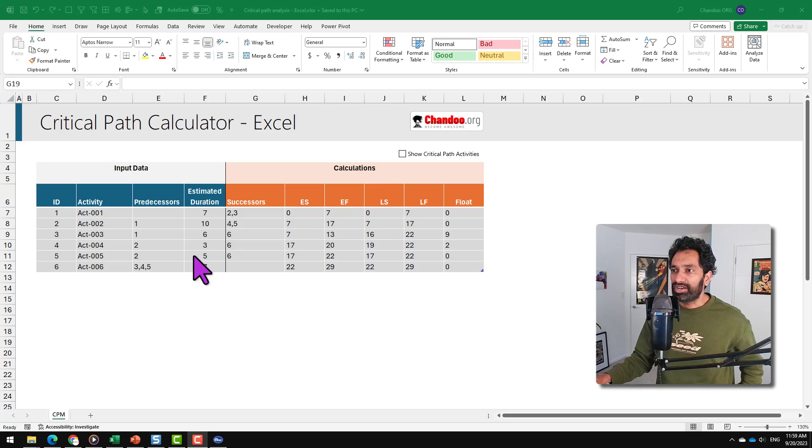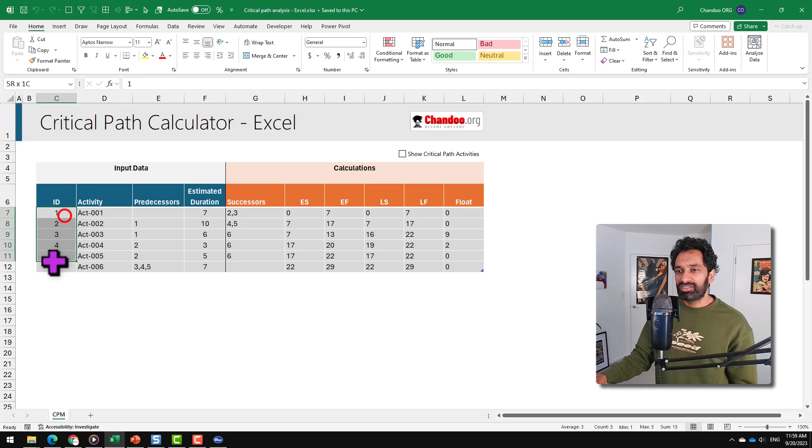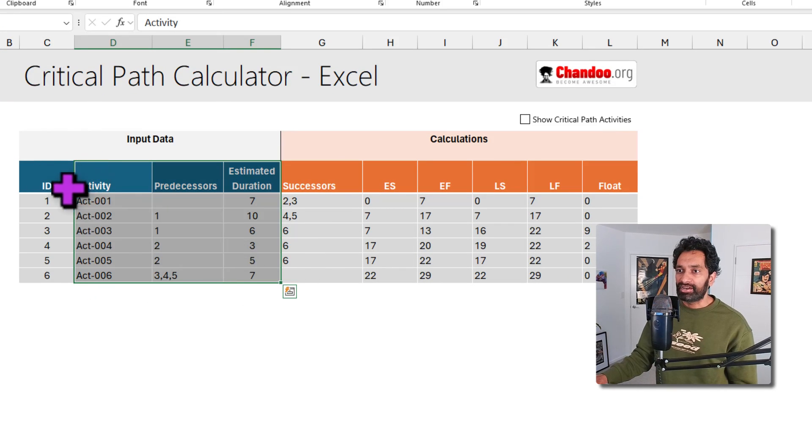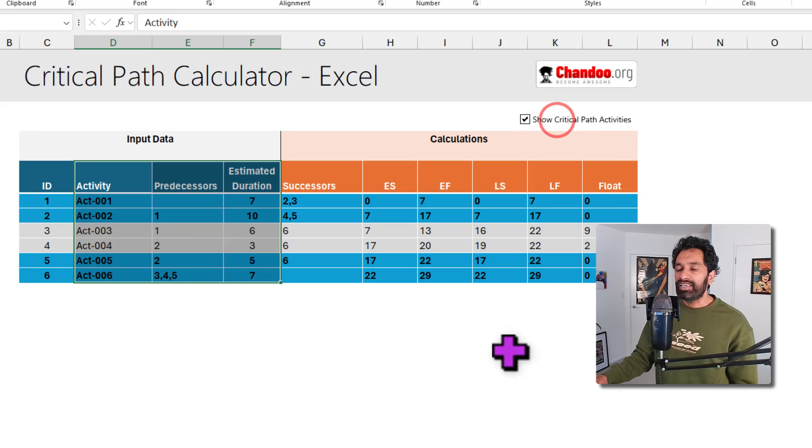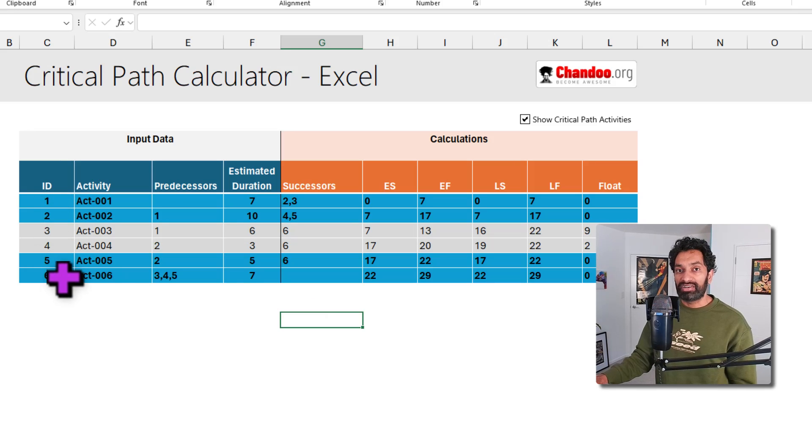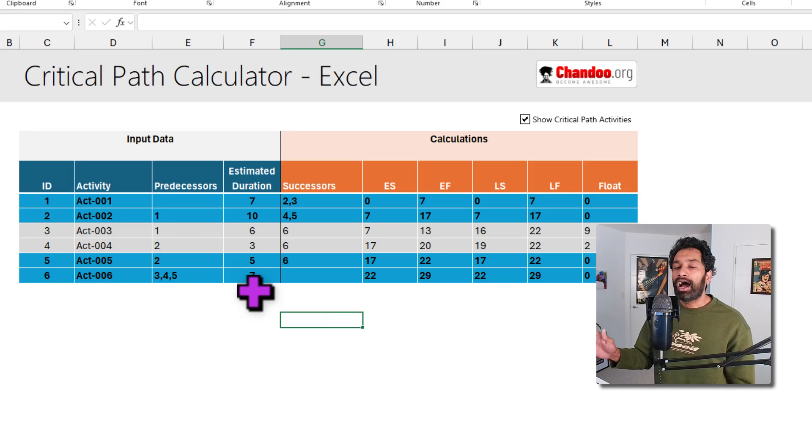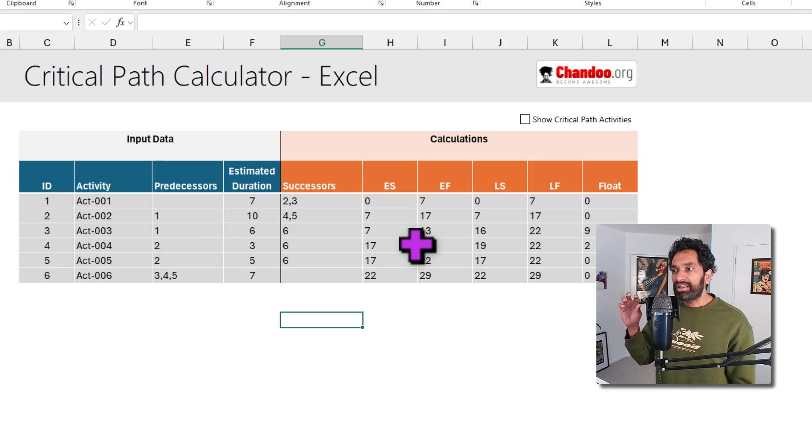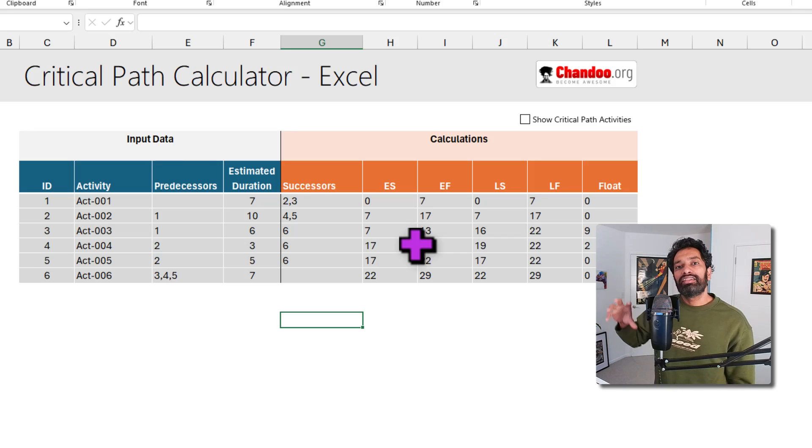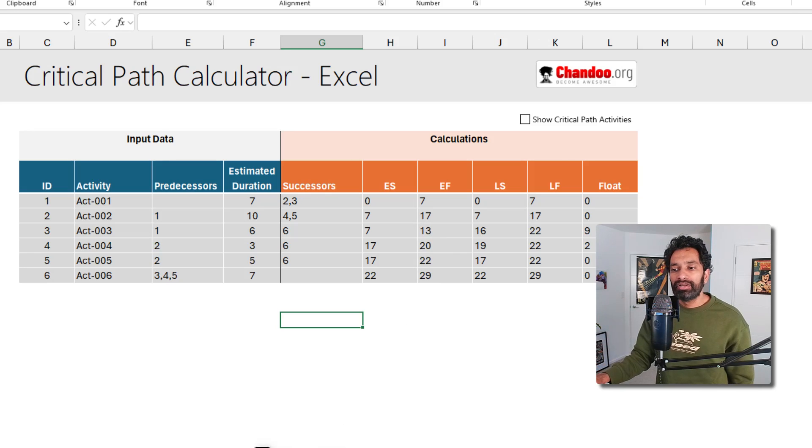Let me show you what I have here. I have a simple project with just six activities, and the information is captured here in the input data section. I can see which activities are on the critical path. Right now, activities one, two, five, and six are on the critical path. Naturally, what this means is if any of these activities were to change, like their duration or their dependencies or anything, it's going to have an impact on the overall project duration and the scheduling. So let's first understand the concept of critical path, and then we can see how to do the implementation through Excel.